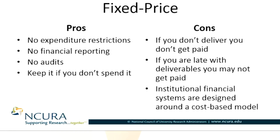At our institution, not all of our PIs always submit their technical reports or project deliverables exactly by the deadline the sponsor is expecting, as required by the award document or contract. Depending on how the contract is worded, you may end up not getting paid or getting paid a reduced amount because the deliverable was late. That's certainly a higher level of risk than most universities are accustomed to.